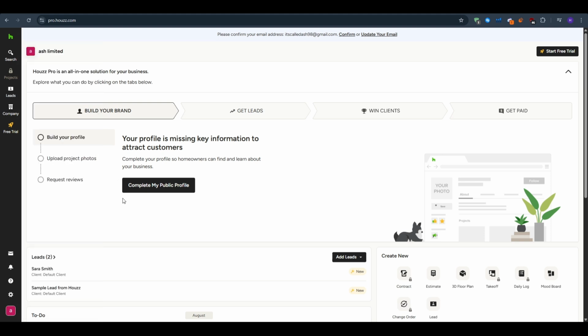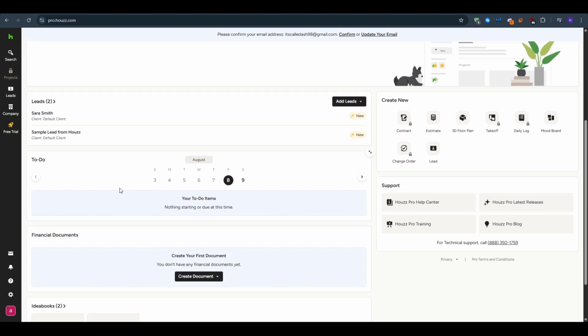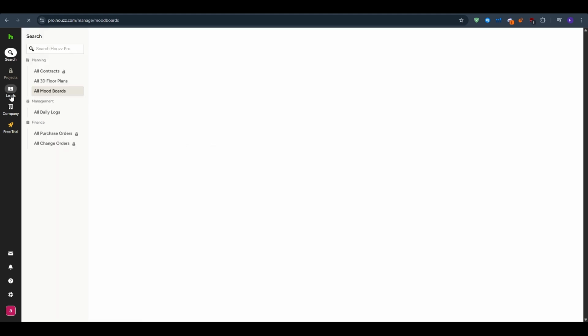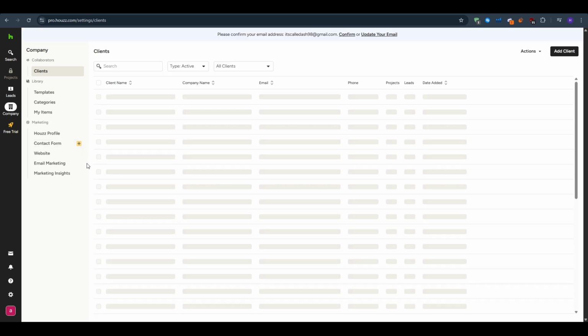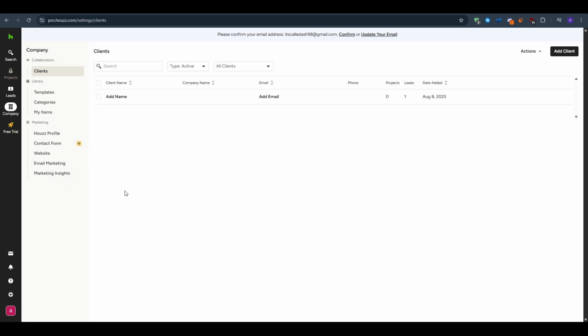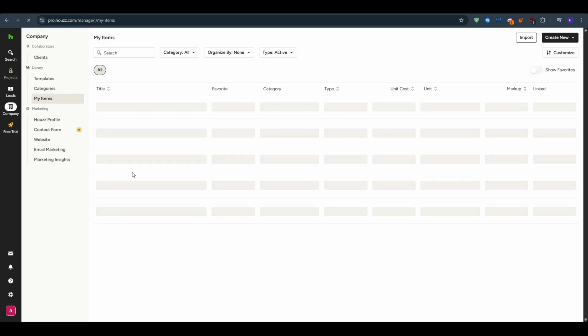And then we have the invoices and the payments, as you can convert the approved estimate or change order into an invoice. Houzz partners with Stripe, so clients can pay ACH or card directly inside the portal. And then we have the timeline and daily logs, so you can snap photos from the mobile application. They auto tag by date and location and land in the client portal to prove progress without extra emails.